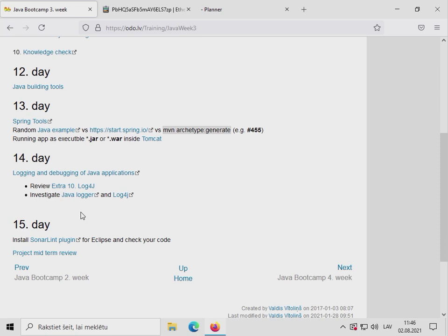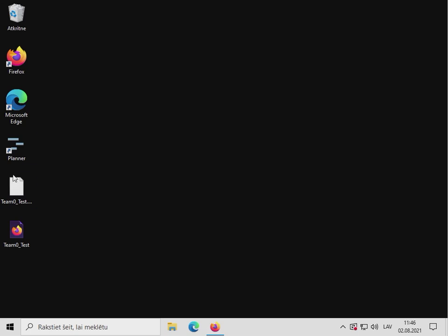And so, depending on your attitude, you may plan, for example, half an hour for daily communication with the teacher, or up to 1 hour, definitely not more than 1 hour, because that means we are wasting too much time on communication, planning and reporting, not actual work. But if you ignore this, that also is okay, it just means your plan will not highlight everything. And then, as I told you, there may be some unplanned things. Actually, one thing may be planned.